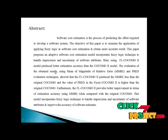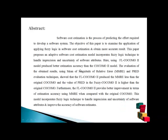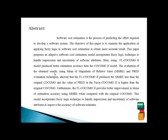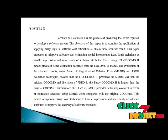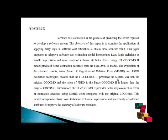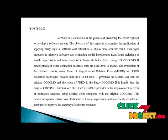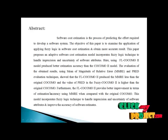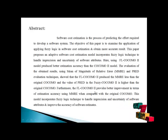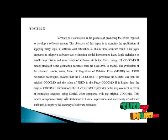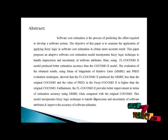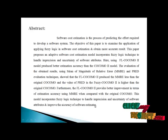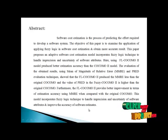Using fuzzy logic, the COCOMO 2 model produces better estimation accuracy than the original COCOMO 2 model. The evaluation uses mean magnitude of relative error (MMRE) and PRED evaluation techniques. The fuzzy logic COCOMO 2 produces MMRE less than the original COCOMO 2, and the PRED value in the fuzzy COCOMO 2 is higher than the original COCOMO 2. This model incorporates fuzzy logic techniques to handle imprecision and uncertainty of software attributes and improve the accuracy of software estimates.